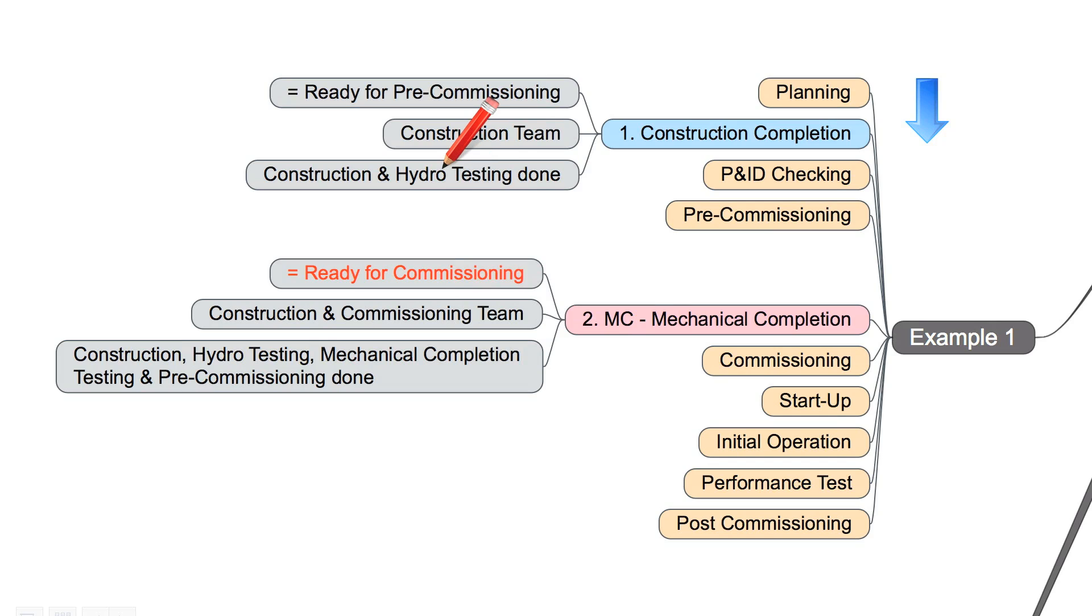Example number one. Here you can see our key elements for successful plant commissioning. It starts with planning, goes through construction completion, P&ID checking, pre-commissioning, mechanical completion, commissioning, startup, initial operation, performance test and post-commissioning. And in this example you can see mechanical completion means it's ready for commissioning.